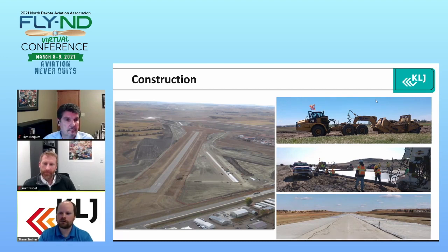completed. So really going into next year, once we rip up the existing runway and we get into the existing subgrading and connect those two pieces, hopefully we'll have everything finished up. And we're looking at overall construction schedule to be substantial completion is September 15th of this year.